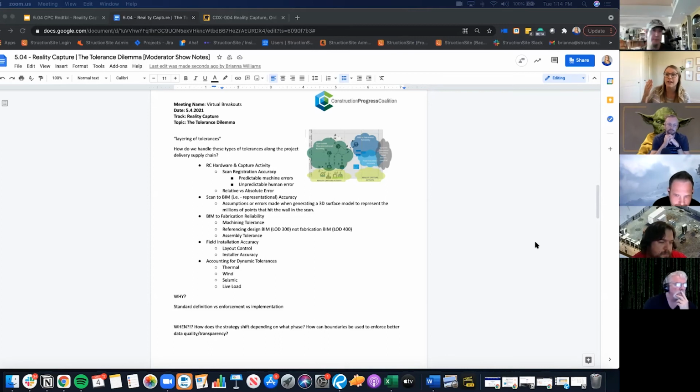So you need to understand: how often am I scanning? At what stage do I need to scan? What scanners am I using? If you think you're just going to scan once and have it work end to end for all of these situations, it's not. And you have to understand where all the risk is throughout this. That's why Kelly had said, go back and scan once it's demoed to be able to confirm. Then you can start doing the prefab after you've done that gut check.